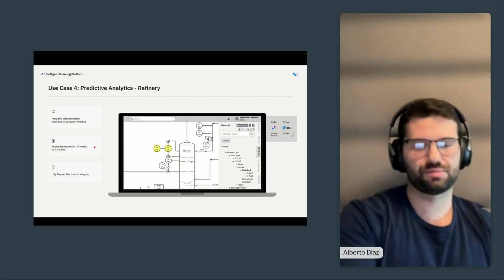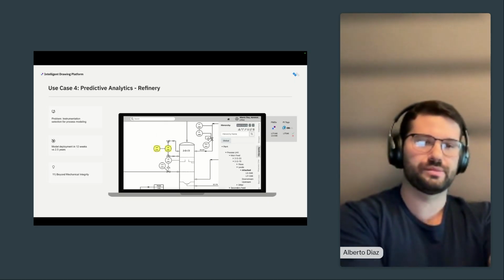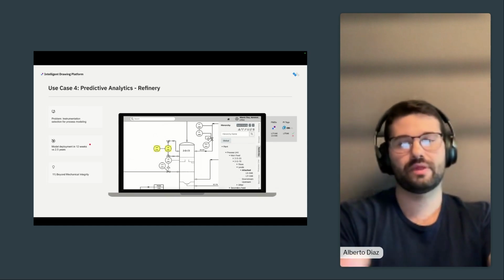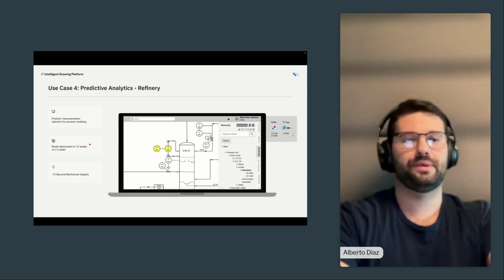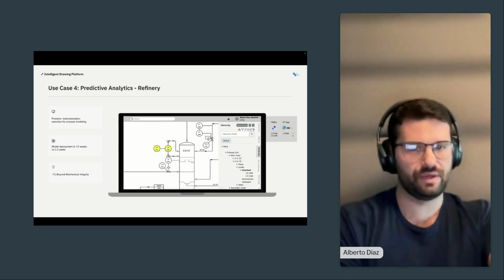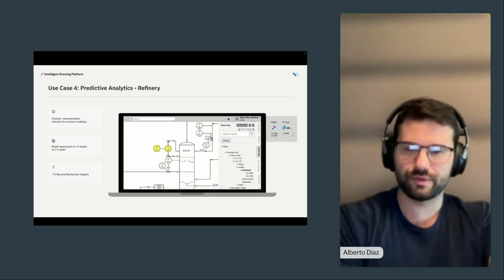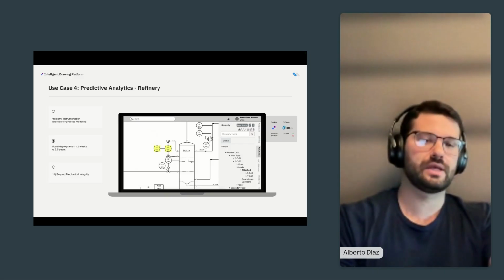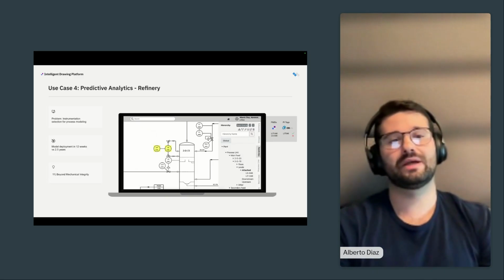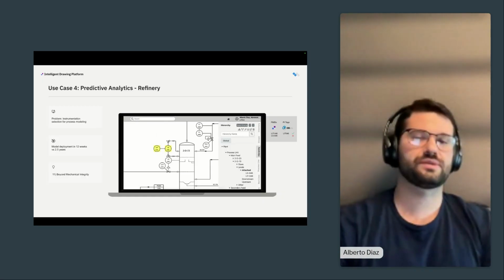The scope of work for this project involved over 5,000 P&IDs, piping and instrumentation diagrams, and we were able to then execute this work thanks to the hierarchy tool within IDP in 12 weeks, as opposed to the originally expected 2.5 years that this might have taken the customer just by manually reviewing the drawings and collecting this data into Excel. Not to speak of the potential data entry issues that they might have had as part of this particular process.